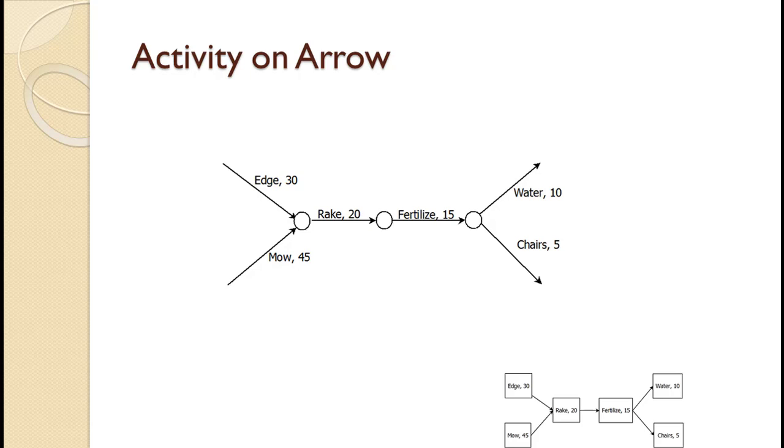First, Microsoft Project and most major project management software uses activity on node diagrams. Second, AOA diagrams tend to be more complex than AON diagrams for the same projects, although that was not the case in this simple example. Third, in more complex projects, AOA diagrams tend to need far more dummy activities than AON diagrams. While some project management textbooks still use AOA notation, every operations management textbook I know of uses AON notation. For that reason, we will use activity on node notation for all of our project tutorials.